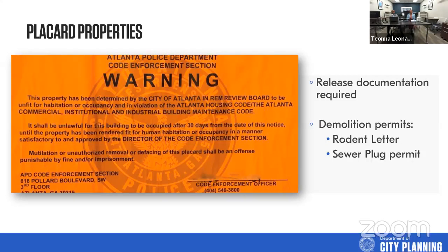Once you are issued the permit, you are required to have regular inspections. Whether you pass or fail the inspection, each inspection gives you 180 days from the date of the last inspection. So just continue to have your inspections regularly and your permit will stay active.